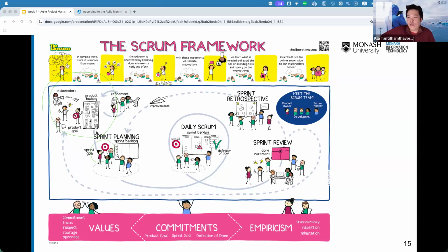First, within the next 2 weeks, we're going to ship the product catalog feature. We discuss these are the things that we need to do, and put everything from the product backlog into the sprint backlog. Product backlog is everything we need to do, but we cannot do it now. Sprint backlog is the things that you need to do within this sprint. And the sprint can last 1 week or 2 weeks. It really depends on the team.